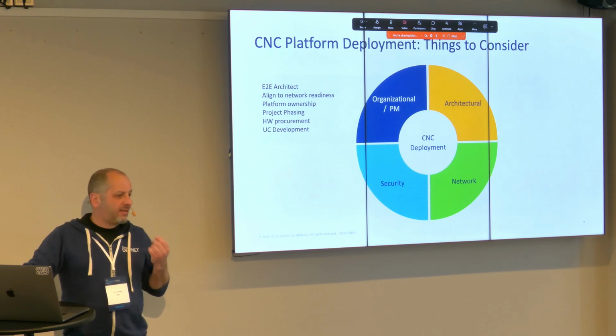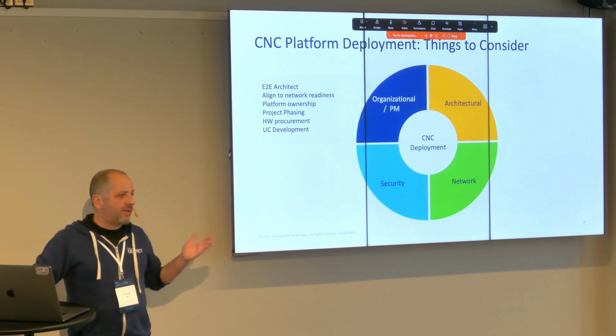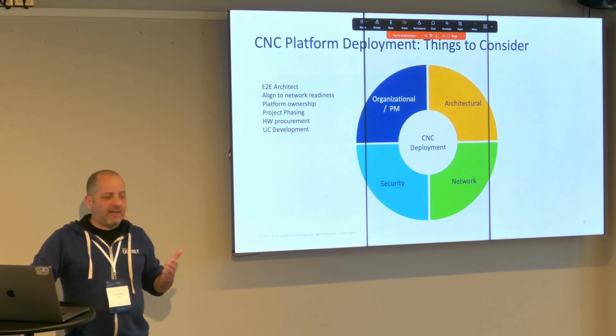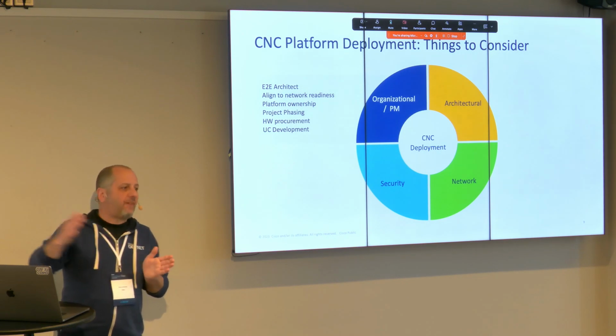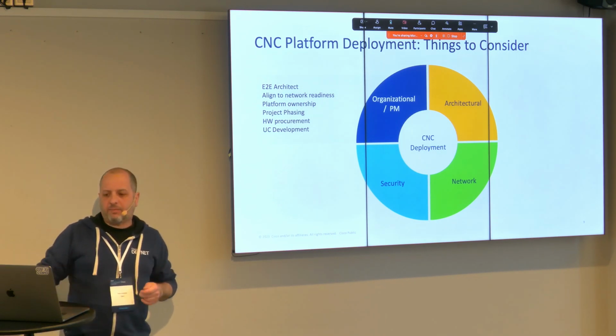Hardware procurement is another topic. So you might already have the infrastructure required to host all these applications, or you might not. So depending on your hardware supply times, you might decide to plan in advance in order to have the required hardware to run the platform.